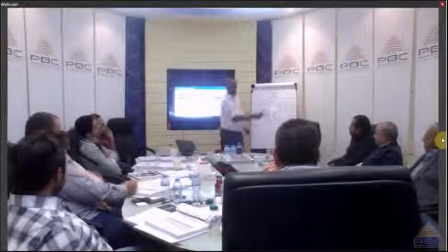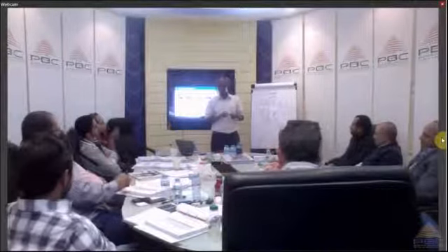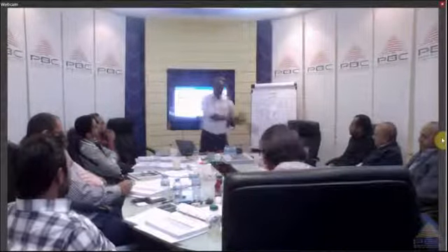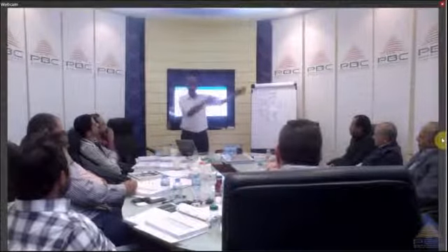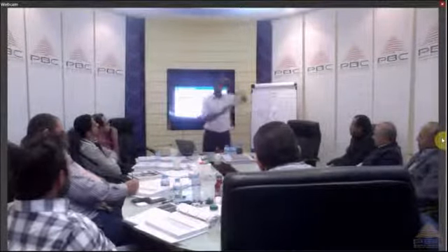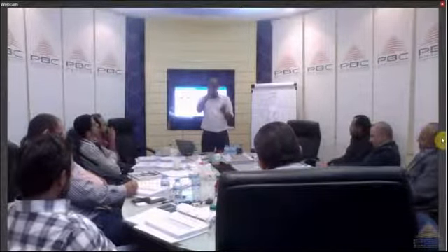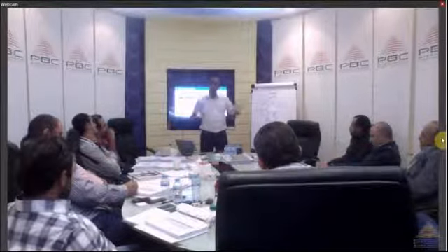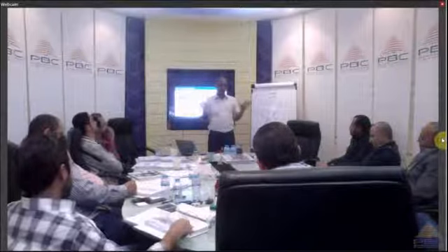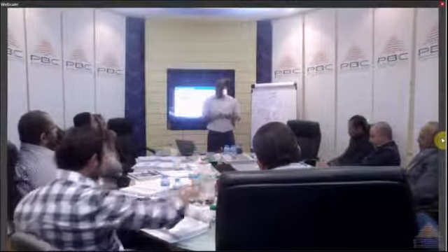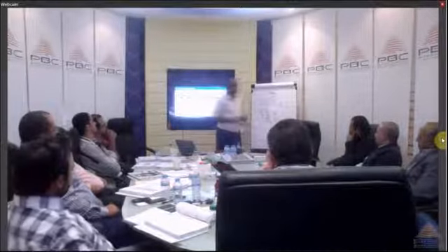Because getting the approval from management is part of your work as a project manager. Don't get rid of it and say it's not my responsibility, I'm just going to give it to the manager and they have to say yes or no, and how long it takes is up to them. If you start tuning your brain into this wavelength, all your projects will be one big critical path. Everything will be delayed. You have to have ways to influence that. So management decision is not a lag at all.